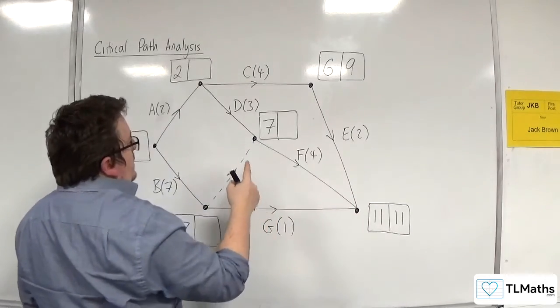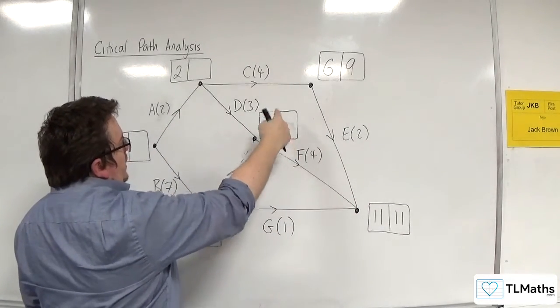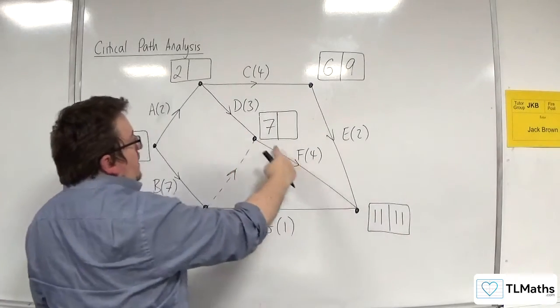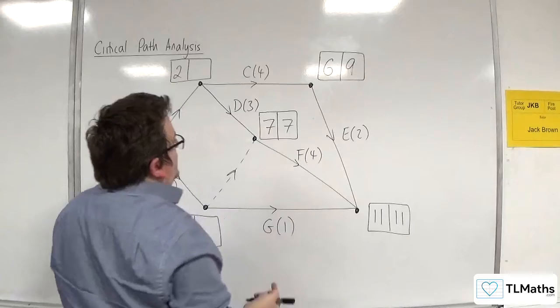Now let's go with, can I do this box? I can do this box. Let's do this box. 11 take away four is seven. So that will go there. Because that's the only route back into that box.